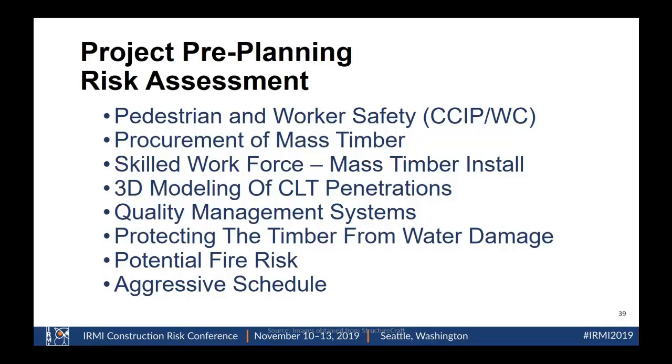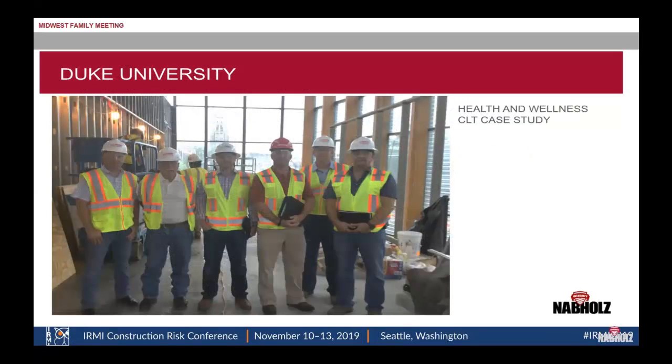Some risk assessment, and I had generated this presentation for people that were in the risk management profession, which is similar to what you guys do, but not completely. We did a CCIP with Workman's Comp, which I don't know if that means anything to y'all, but it's a contractor controlled insurance program with Workman's Comp. We had the issues of procurement of mass timber, finding the skilled workforce, the modeling of the CLT penetrations. We'll talk more about that. Quality management systems that we put in place, protecting the timber from water damage, potential fire risk, and a very, very aggressive schedule.